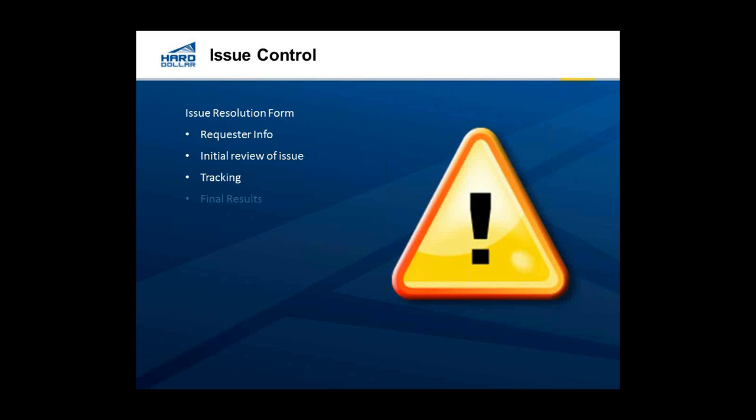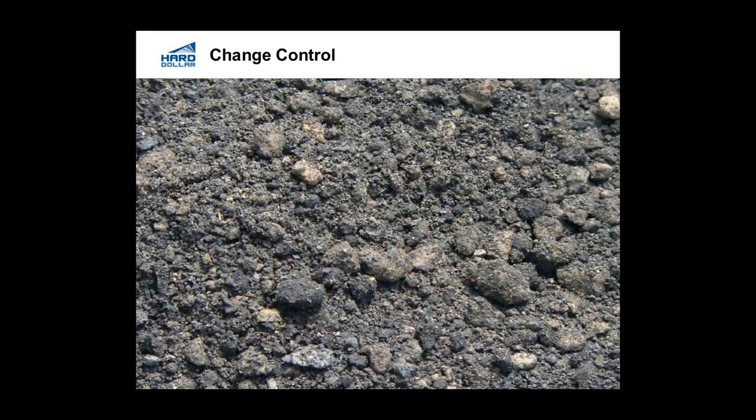So what we're looking at here is soil. This is contaminated soil, has a lot of oil in it. What happened in this case was a contractor was doing some excavation work close to an old timber mill, and without anyone being aware, they had buried a bunch of the PCB oil in the ground, and no one knew about this at the time of the contract. So this is not part of the original scope to remove this soil. So the contractor goes to the owner and says, hey, this isn't our deal. We need to have a change order because it's going to be a lot of cost for us.